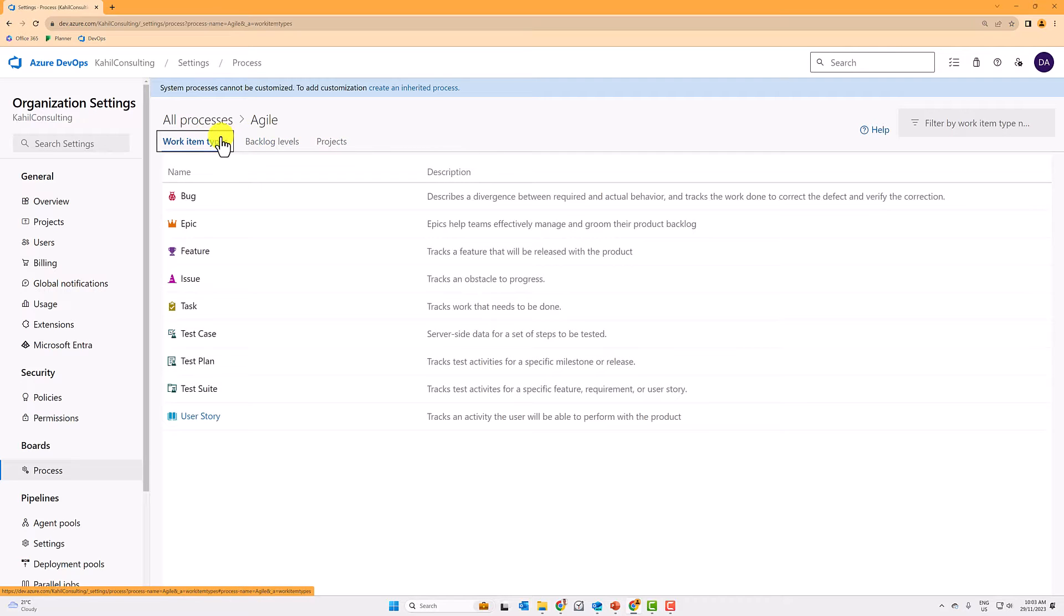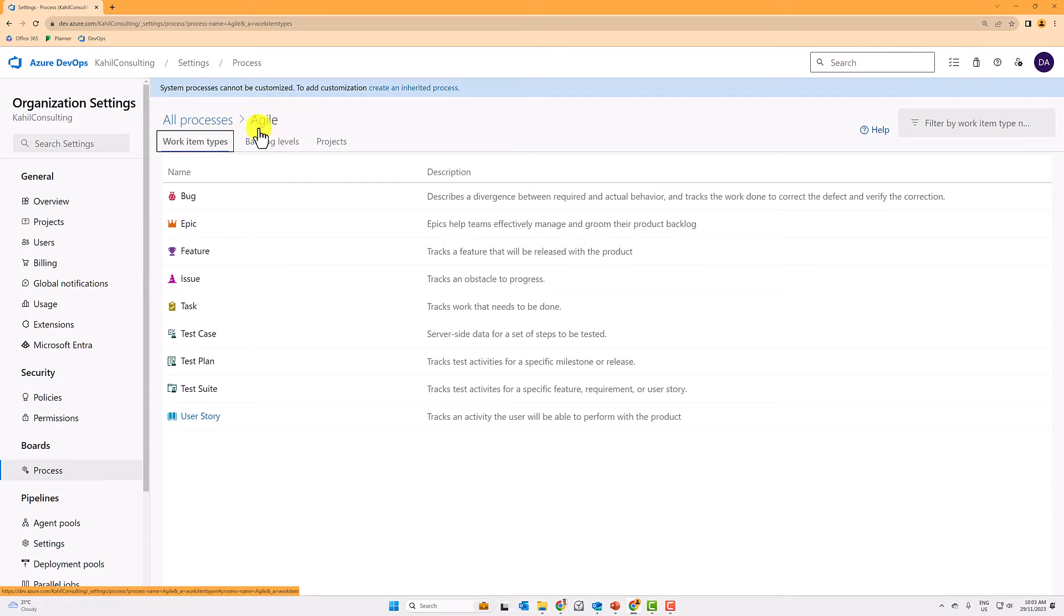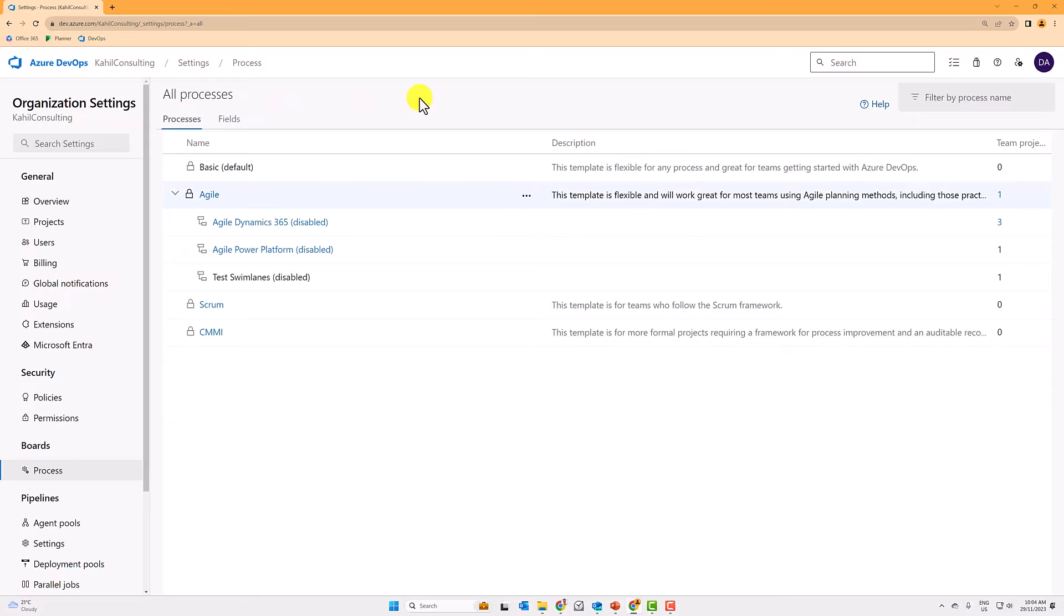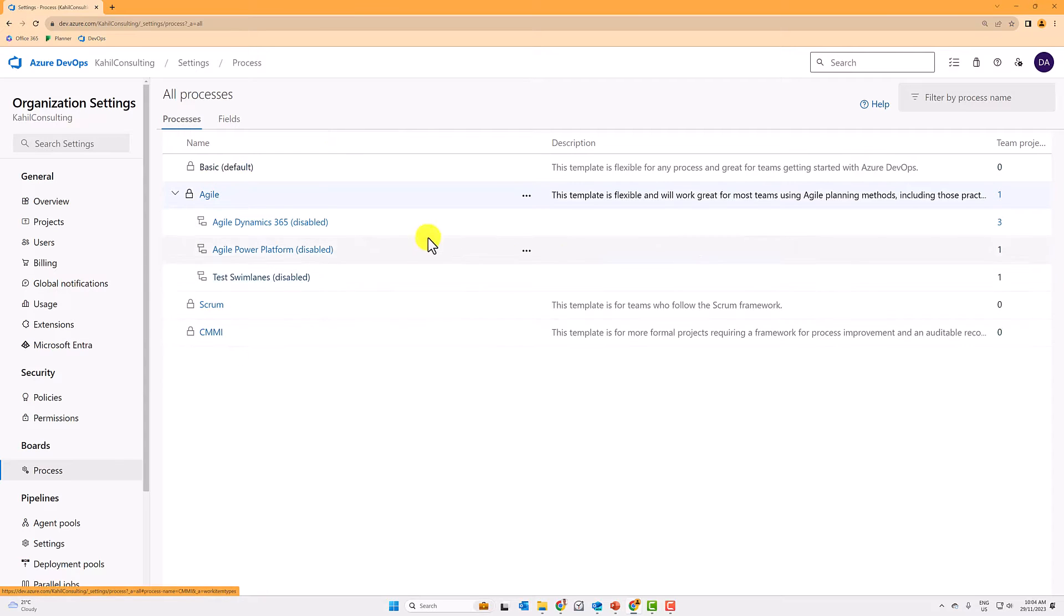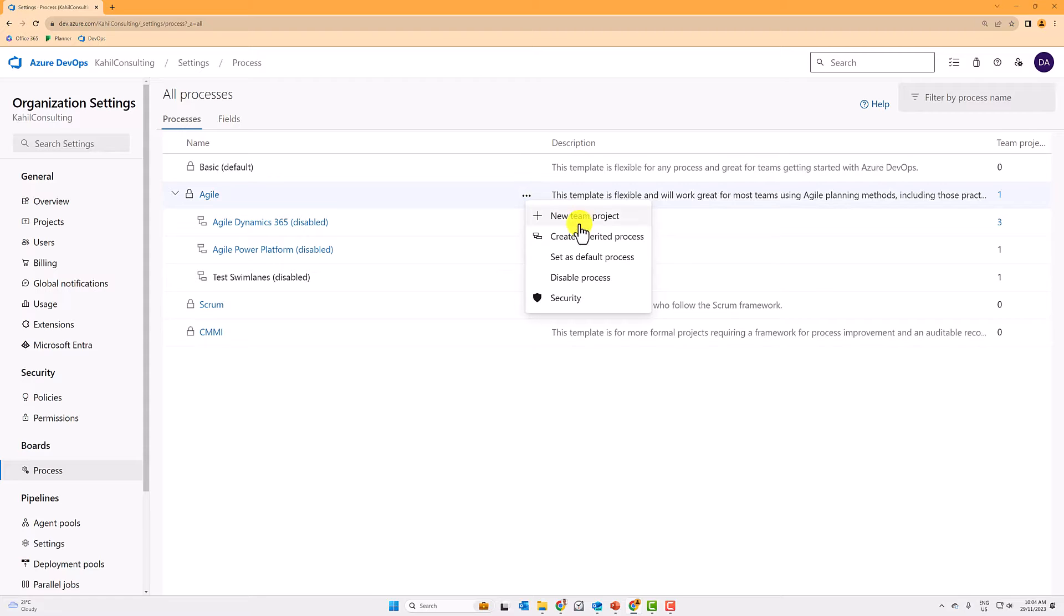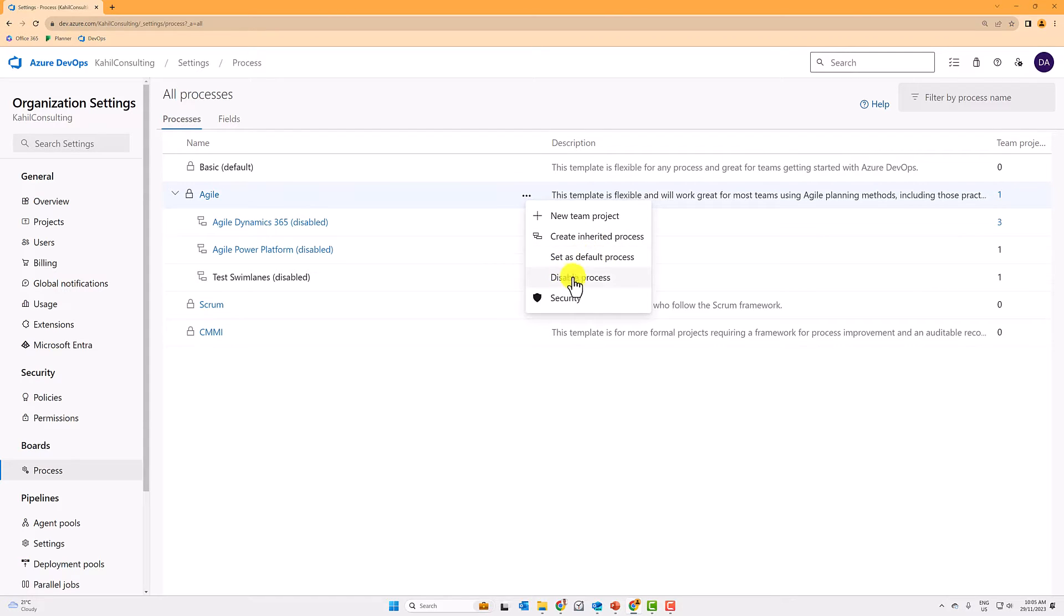You cannot change one of the four default processes that are getting delivered with Azure DevOps boards. However, you can create a custom process based on one of those four default processes. So to create a new custom process basically from one of those basic processes, you can go to the three little dots and then you can either create a new project or you create a new inherited process. There are some other features here where you can set this one as default when you start a new project or you can disable a process.